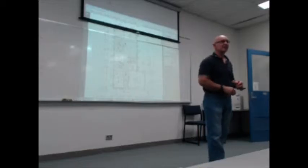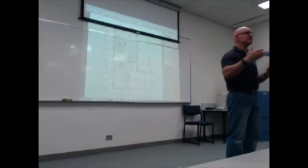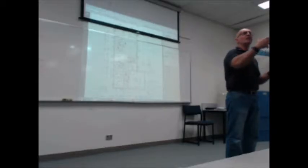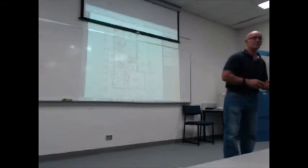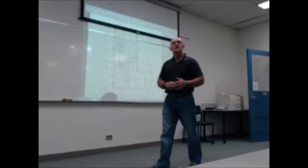Yeah. So every bit of wastage you have is money, but at the same time, you've got to balance out that wastage factor against the cost of replacing the concrete, or whatever. The time and that, it's better to allow for it and have it left over and it's covered in a provisional sum than not allow for it. No, it's got tiles in it. So I added my 10%, I got 19.